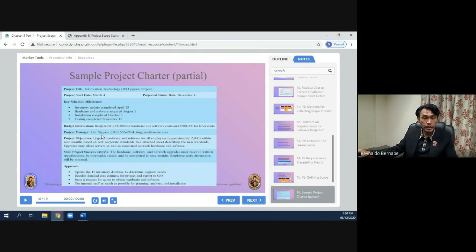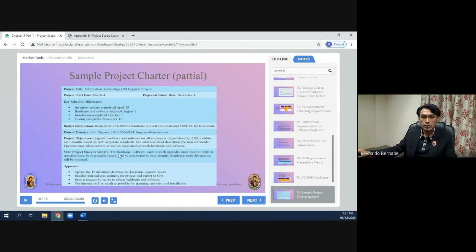The project manager section lists the name and contact number or email. Project objectives include upgrading hardware and software for all employees within nine months based on new corporate standards. The main project success criteria state that the hardware, software, and network upgrades must meet all written specifications, be thoroughly tested, and be completed in nine months, with minimal disruption to employee work.